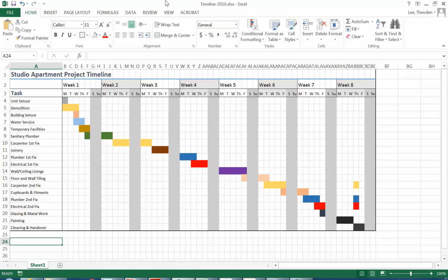Even though some of you did the areas for the different spaces, what you really needed to do was areas for costing. For that, you really just need a square metre area for the whole space or the whole proposal. And then you could maybe break it up into indoor and outdoor space. Sometimes you can treat wet areas separately as well, but usually you can just do the whole area. But also we wanted you to look at doing a square metre area for your wall surfaces.